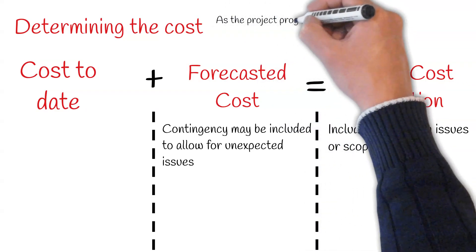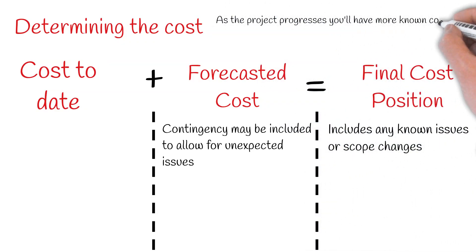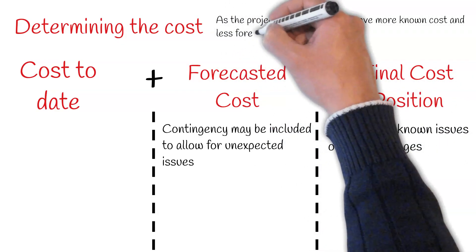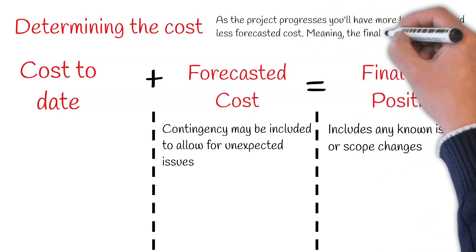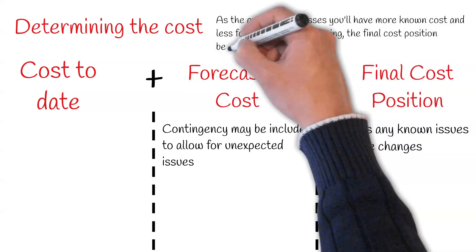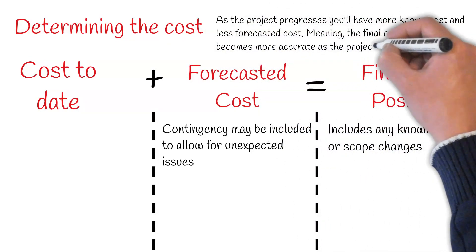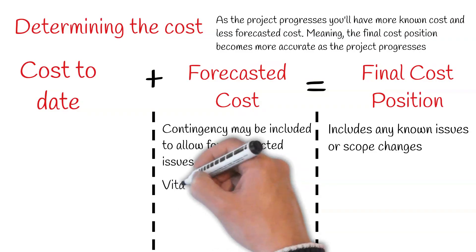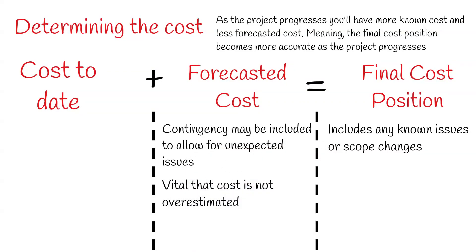As the project progresses, you will have more known costs and less forecasted costs. This means the predicted final cost position becomes more accurate as the project progresses. It is vital that the cost is not underestimated.